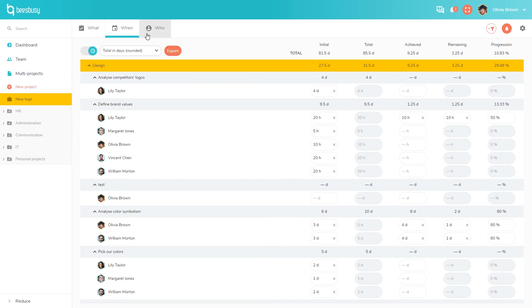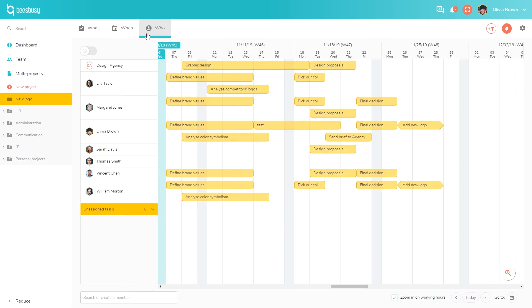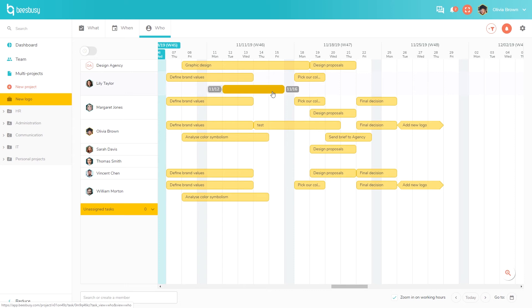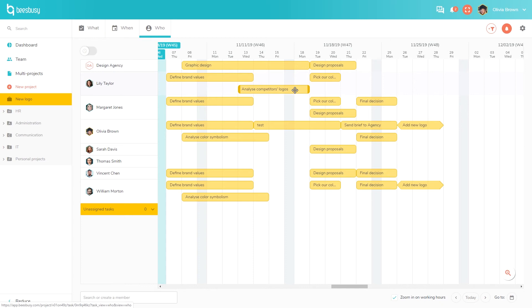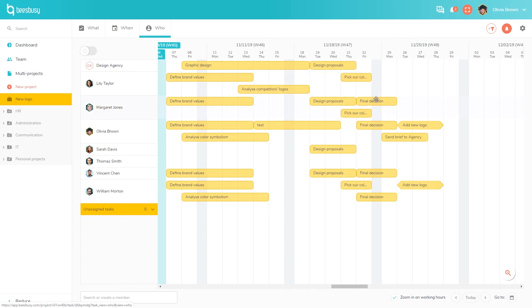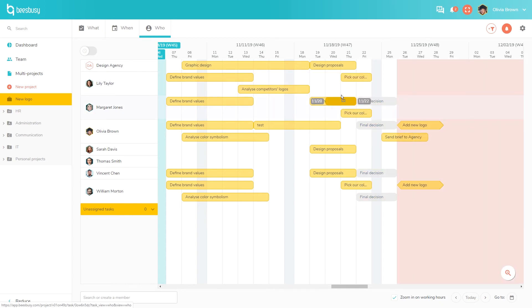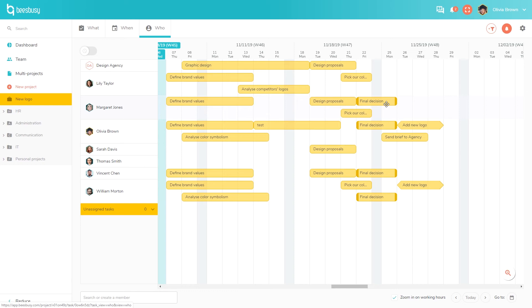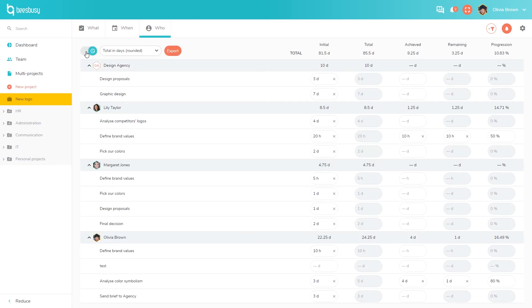Now we'll go to the Who view, which displays all the information in a team schedule. You will see all the tasks assigned to the project members. You can also update your planning here and see the consequences for all members. If you want to move a task, you can do so here and you can also see that way the time limit. Again, you can display time tracking by clicking here. This time it will show for each project member their assigned tasks and the time for each task.